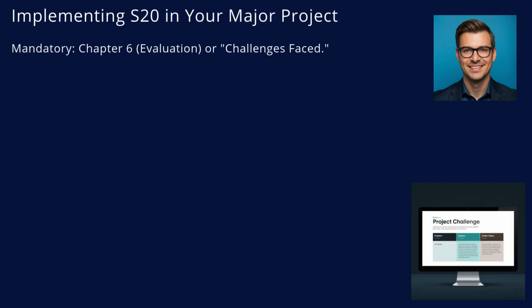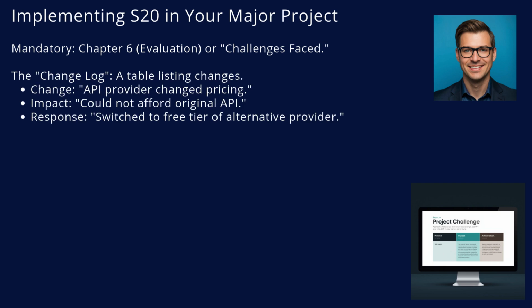In your major project, S20 lives in the evaluation or challenges section. Create a change log table. Column 1, change problem, e.g., the API provider deprecated the endpoint. Column 2, impact, e.g., our data import failed. Column 3, response, e.g., I researched alternatives and rewrote the adapter to use a different source.